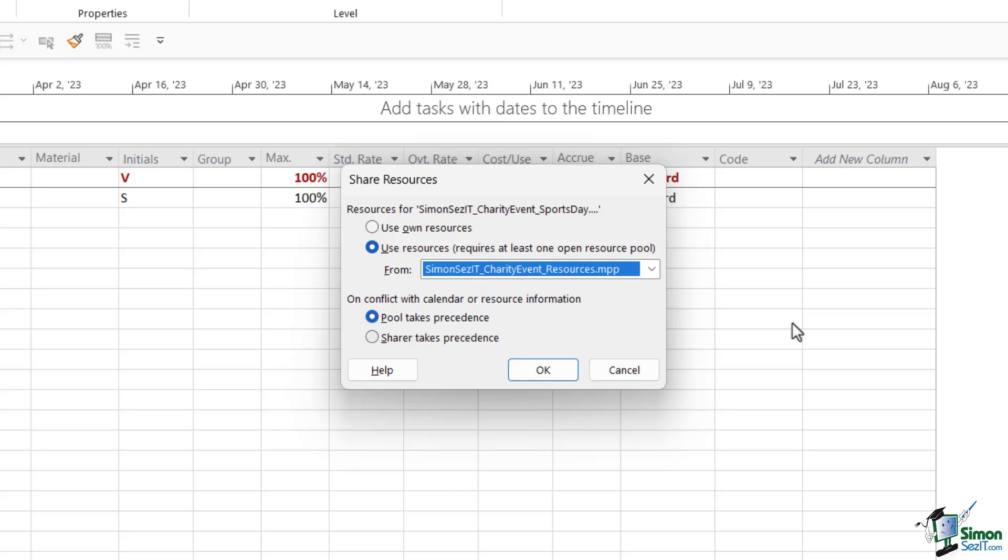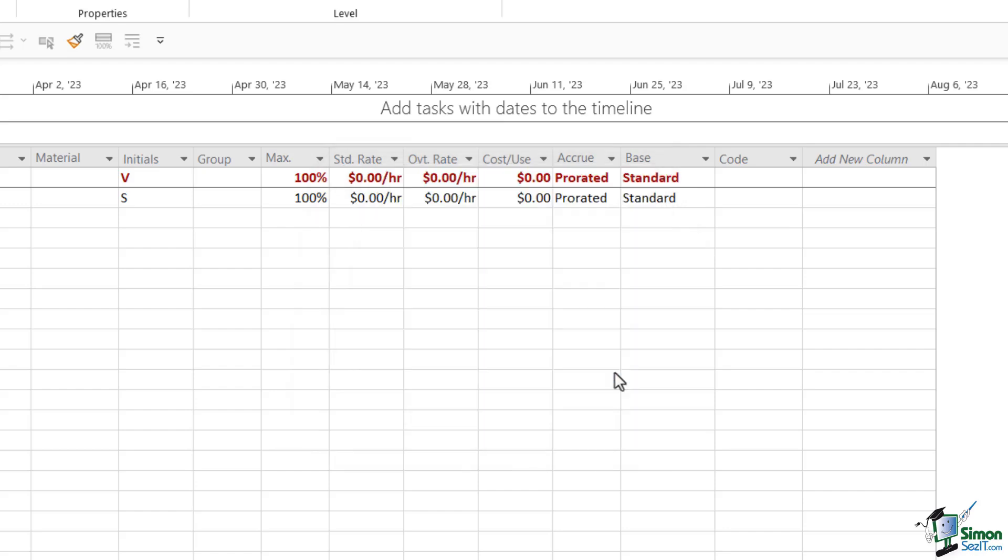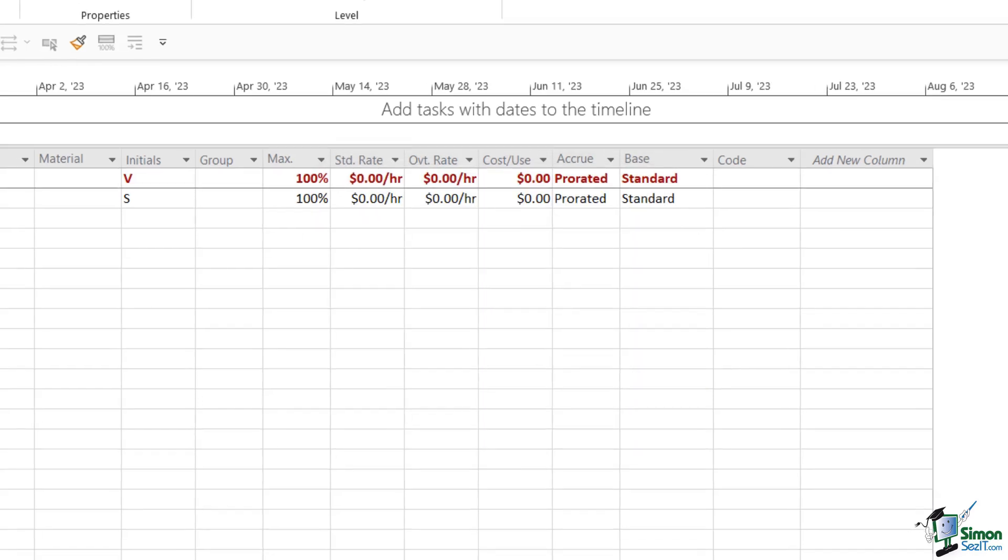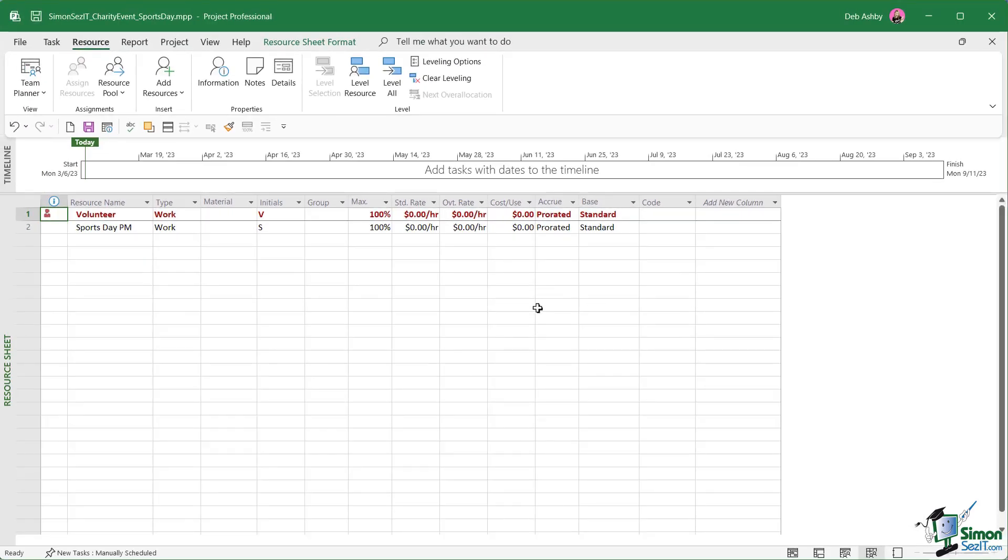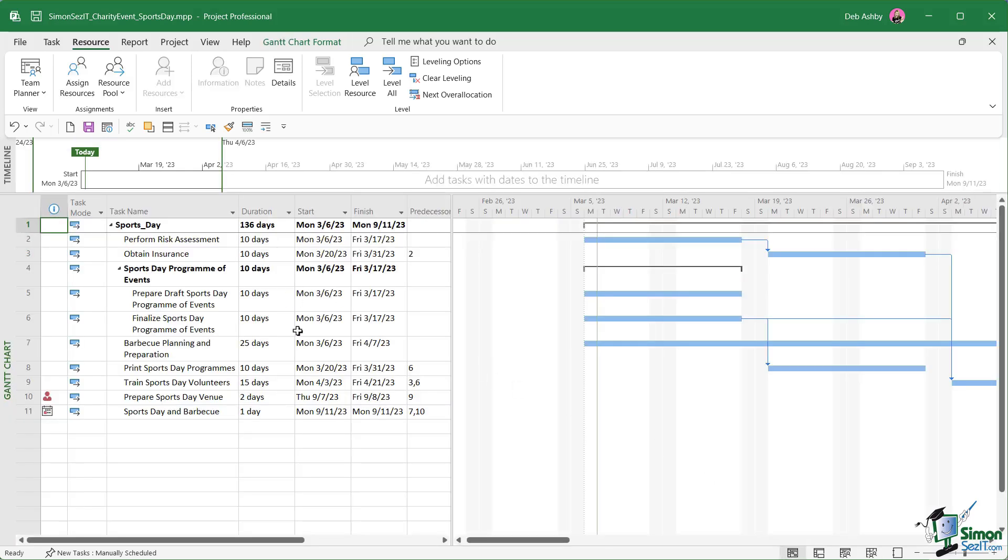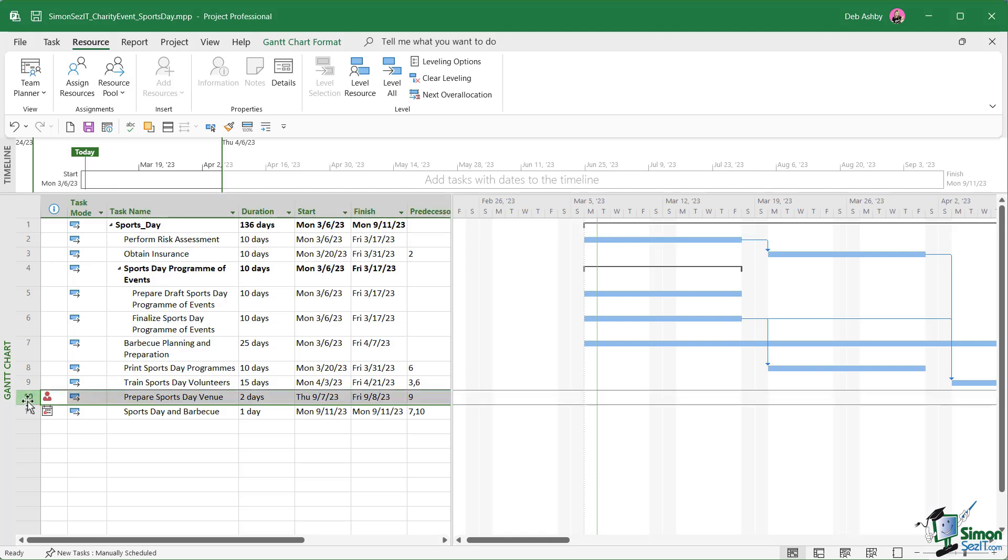We're going to look at this in a bit more detail a bit later on. But what can sometimes happen is that there may be a conflict between the resource pool and any calendars applying to the resources in the resource pool and calendars in the sharing project. So we need to specify which takes precedence, the pool or the sharer. Before we do this, I'm actually going to click on cancel here because I want to demonstrate what happens to over allocated tasks when we assign a resource pool. Let's jump back to Gantt chart view for one moment. If you take a look in our tasks, you can see that task 10 is currently showing as over allocated. That's a little red icon we can see in that first column.